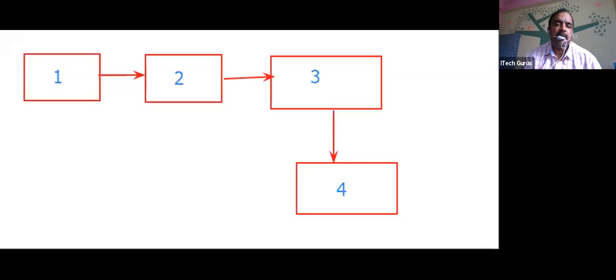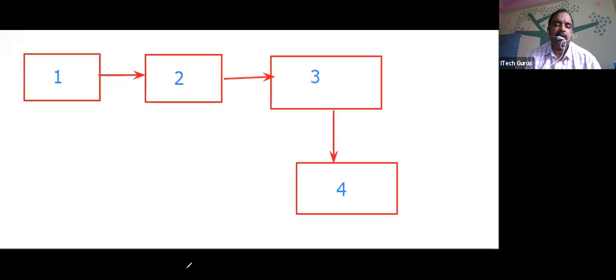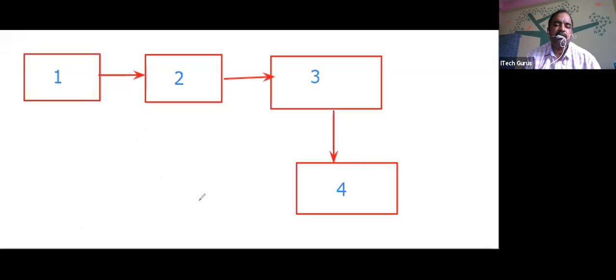See, in a traditional project, which one is fixed? The scope is fixed. Is that clear? And please understand, the cost and timeline is derived from the scope. All of you, is that clear? This is what is called the triple constraint.